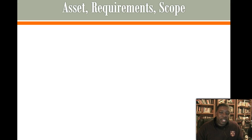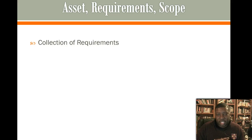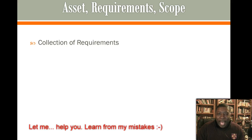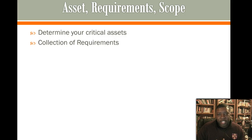Alright, so let's talk about asset requirements and scope. One of the first things you've been taught to do is to collect your requirements, and this is obviously after you identify your stakeholders. But I am going to tell you something different, because I am your cyber security quarterback — I've done this, I've hit all the potholes, I've seen where things go wrong. So what you should do before that is determine your critical assets. Determine what is important to your company and then test the security to those things, and make that part of your scope.